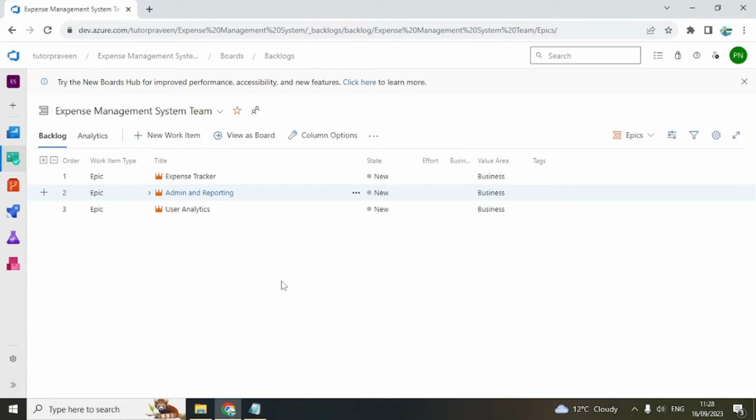Developers will be almost free and in a support mode, and you can do planning without affecting the other sprint. Otherwise, if you do it on a Monday, that day is gone and your sprint becomes shorter. So you do planning before the actual start date of a sprint.